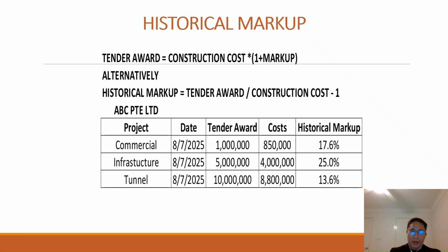So irrespective of whether we are successful or not, we should record our historical markup, not only for us, but also record the historical markup from the other competitors.